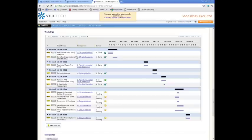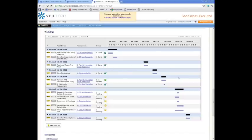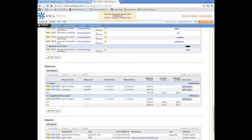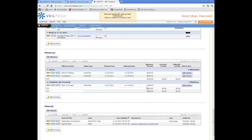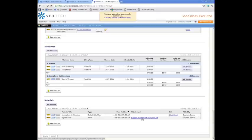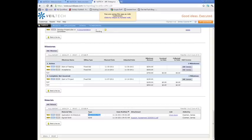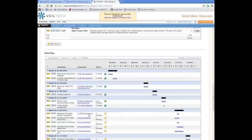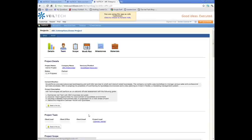The coolest thing we put up is a work plan. As we're assigning out tasks to get the project complete, it's actually developing the work plan that the client sees. Because we get that all the time: I want to see a Gantt chart of when each part is going to be completed. We're just going through our normal process of assigning stuff out to our developers. In real time, it's updating the work plan that they can log in and see. They can see where we're at with our milestones. They can see material related to their project, the signed SOW, maybe a data entity map, training material. We typically will post training material they can use.